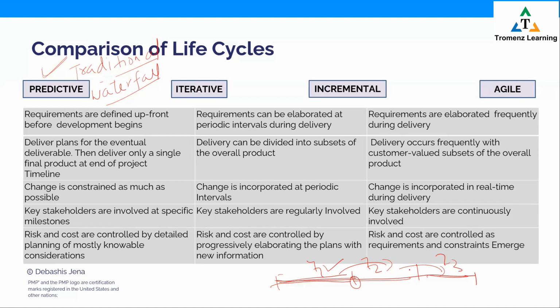And also watch in terms of planning. Even here in iterative incremental, you've got a project plan. You have a plan like predictive, but the difference is, watch, in my project plan only iteration 1 is planned to a detail level right now. The other two, iteration 2 and iteration 3, are only high level planned, not planned to the detail level.